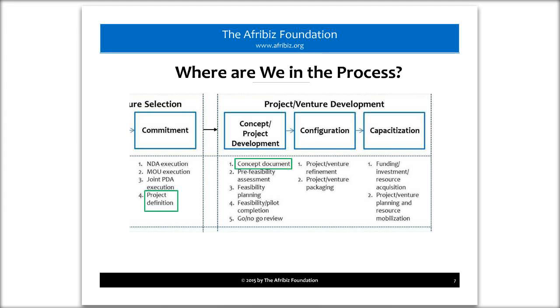For example, just giving you a few of the parts, you need to have acquired the site, you need a power purchase agreement, you need to get your permits, your interconnection agreement, and you need dialogue with key stakeholders and their agreements, and it has to be in writing. All of these different variables will develop at a different pace, and so you're literally iterating every single time you get something anchored, something tied down.